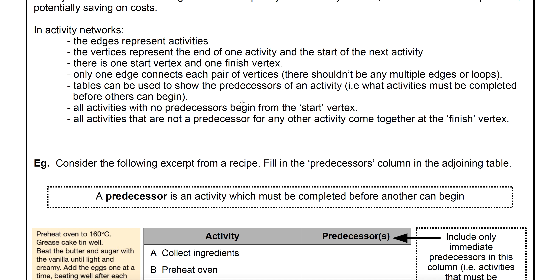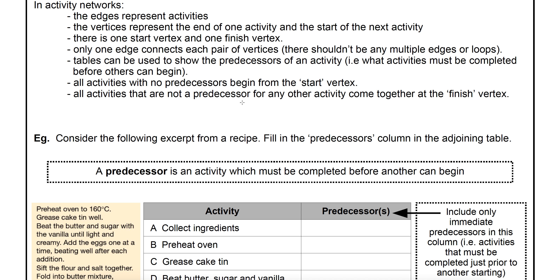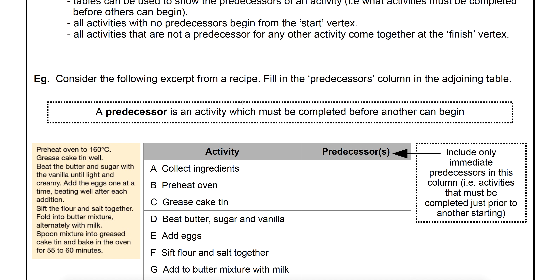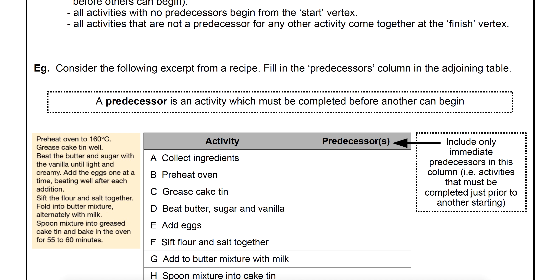The tables show what we call a predecessor of an activity — what has to be done before another activity can begin. If an activity is a predecessor, it has to be completed before the next one can start. All activities that don't have a predecessor will start at the beginning, at the start vertex. And if an activity is not a predecessor of anything else, it's going to come together at the finish.